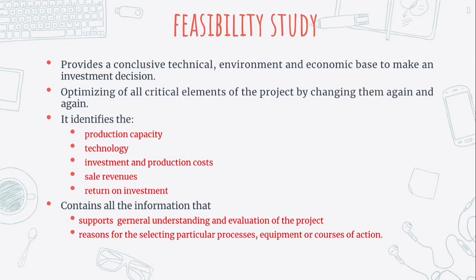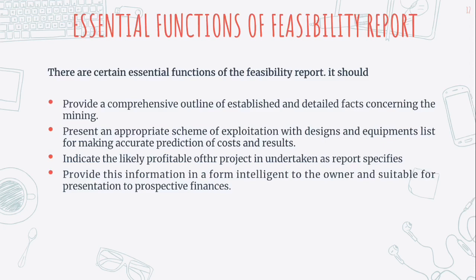Feasibility study. A feasibility study provides a conclusive technical evaluation. It also optimizes all critical elements of the project by changing them again and again. The feasibility study identifies the production capacity, technology, investment and production costs, sales revenues, return on investments, and also contains all the information that supports general understanding and evaluation of the project, reasoning for selecting particular processes, equipment, or courses of action.